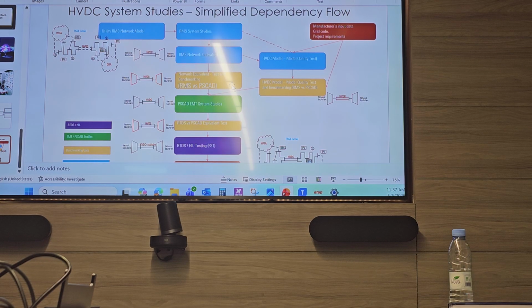They already tried in this project, with the sense study, which could not be accepted. I will use nice words: it was really not acceptable for technical persons. And the scientists said, look, if you don't approve this, then if the shipment is late, the project schedule will be in question. So they put pressure on. It is a common game, and it depends from country to country, from contractor to contractor, but you have to be aware of this and not accept this kind of pressure.